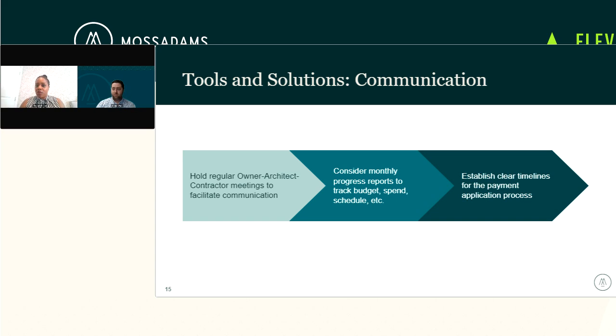So obviously a schedule, baseline versus actual, I think is important. Progress photos, safety, quality. It can cover various different areas. But having that as a backstop and a checking point, so that you can confirm your progress reporting against your payment application, I think is critical as well.